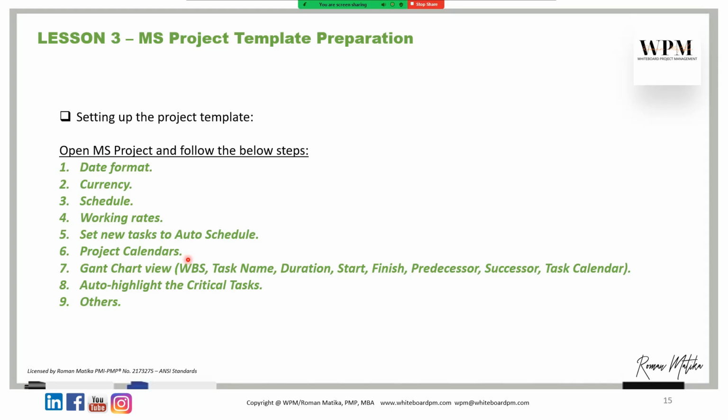Let's say you are in Europe and your project is in the Middle East, then you can put two calendars. One calendar is for Europe, the second calendar is for the Middle East, where they have a weekend on Fridays and Saturdays. In Europe, Saturday and Sunday. The national holidays of each country. You can also add the working hours, whether it's on site work or in office. So you define some calendars and you put them there.